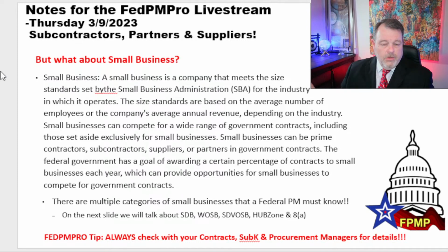So, for example, your contract or contract vehicle may have a stipulation clause in it that says you need to deliver this with 30% small business subcontracting labor or revenue, right? So it says 30% of this delivery needs to be small business. And in that case, a lot of times you may be a small business, by the way. And so if you're the small business prime, a lot of times, again, you're covering some of those check boxes.